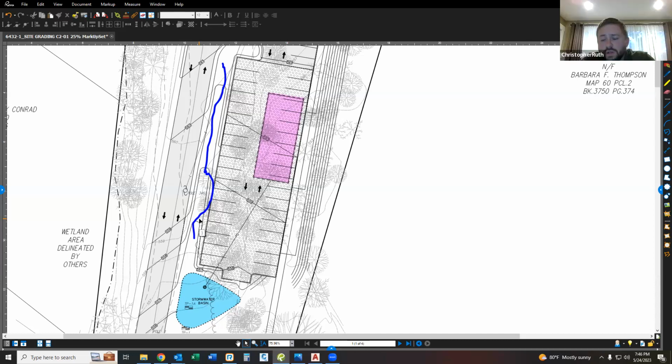I don't know. Anna, if I can touch base a little on this, I've put quite a few of these systems in over the years. They work quite well. Before final drawings are even accepted for permitting, there has to be a maintenance plan in there, and typically we end up legally owing the DEP maintenance records and all kinds of stuff. They have clean out ports in the tops of these chamber systems, and if they're maintained correctly, they'll outlast all of us. Okay, that's good.